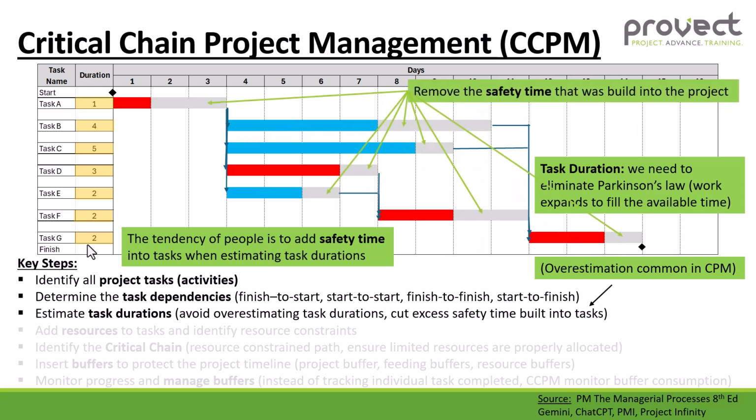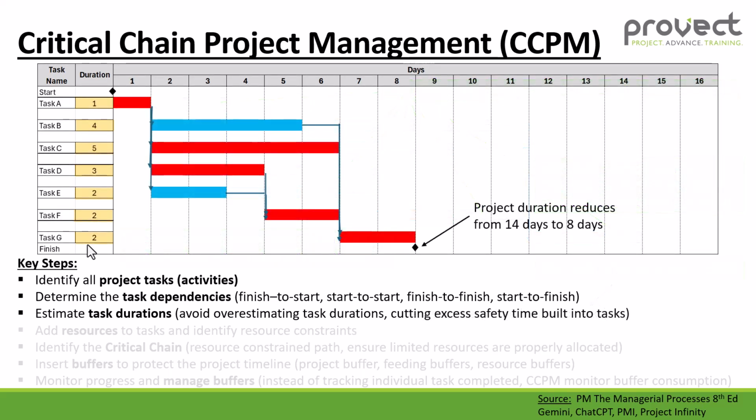So we removed the safety time that was built into our project, and now we reschedule. And our project duration is now reduced from 14 days to 8 days.